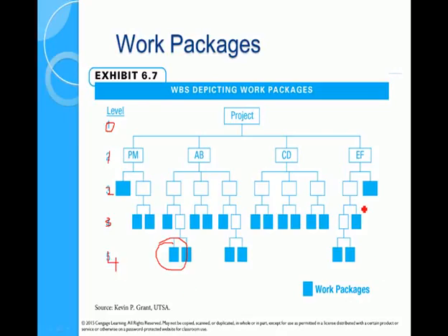So it doesn't matter where the work packages are. This is what I was saying about Woodside. They demand the 3rd level work breakdown structure, so here. But there's no reason for that. You might not need to break this down any further, or you might need to break this down into 2 components, or you might need to break it down further yet.